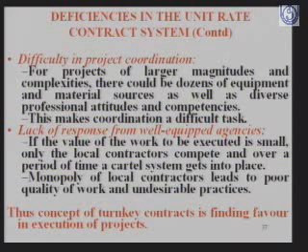For example, in the construction of a building, the electrical contractor can always say, I cannot lay the conduits because the civil work is not complete, and the plumber can say, I cannot lay the pipelines because the civil work is not complete. But if the same thing is given to one authority as a coordinator on a turnkey basis, the responsibility comes to the contractor himself, and he will ensure that this problem of coordination is not there. So difficulty in project coordination is the next problem.